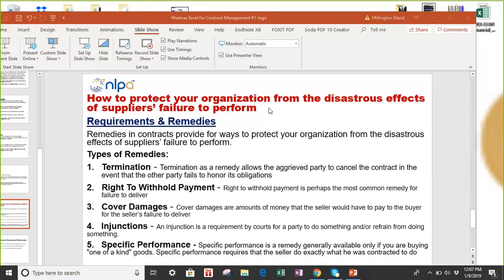So for example, if you have a high level of occurrence, let's say 8 out of 10, and the severity is 10 if you have failures, and your ability to detect if a supplier is going to slip into non-conformance or poor performance is 10, that means you don't have that capability. So 10 times 10 times 8, you have a score of 800, which is the risk priority number. We call it RPN for short.